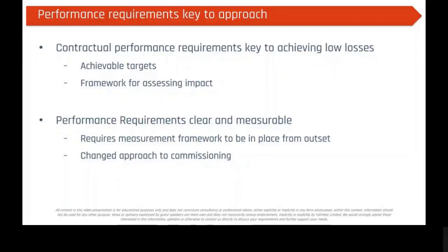And the key is to make those performance metrics contractual by placing them with consultants in employer's requirements and contractors in their employer's requirements. So this is what the design supplement does: it sets out performance requirements, a benchmark and framework of how we get that end-to-end performance from conception to delivery.